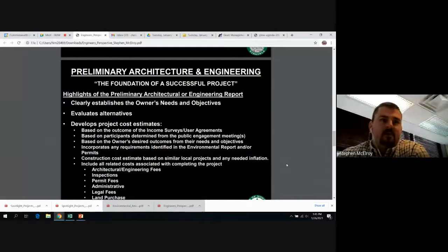Administrative cost, DHCD allows for administrative fees to use for PDCs to go out and verify Davis-Bacon wage rates, to administer the contracts and so forth. So make sure you identify the eligible administrative cost here. Legal fees, attorneys are going to be involved, whether there's loan closings, easements, and so forth. Even easement cost, if you anticipate land purchases or easements, account for them here also.